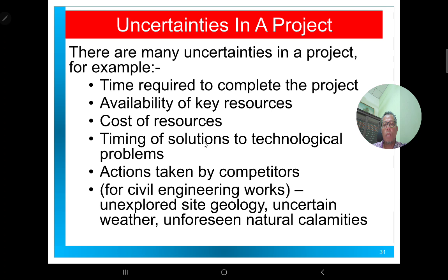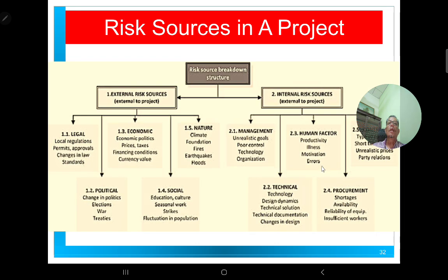Some uncertainties in a project can be caused by site issues, such as unexplored site geology, due to the geological aspects of the site, and also uncertain weather during that time, which makes some of the activities unable to be executed. And of course, in Malaysia sometimes there are floods, so the timing of the particular project planning during natural calamities or disasters will also affect the project.